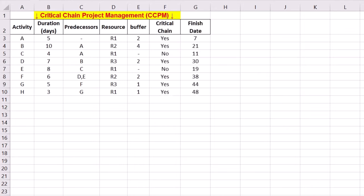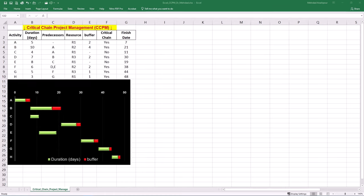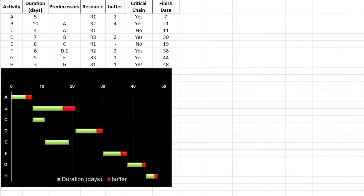Using critical path method or CPM, we can find activity finish dates and also project completion on day 48. Considering this base case, we can use these dates to draw a Gantt chart to visualize the timeline.